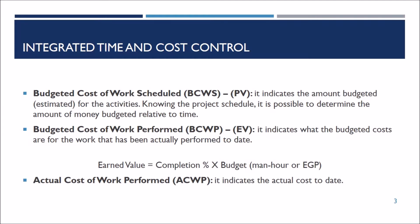Earned value, or budgeted cost of work performed, indicates what the budgeted costs are for the actual work performed to date. To calculate the earned value, simply multiply the percentage of completion by the originally allocated budget. Finally, the actual cost of work performed indicates the actual cost to date.